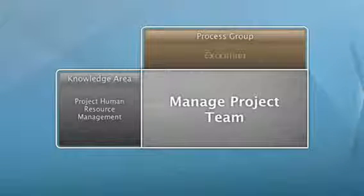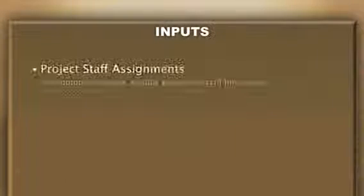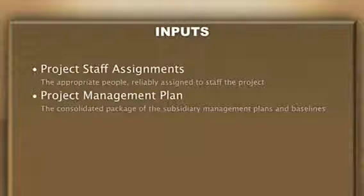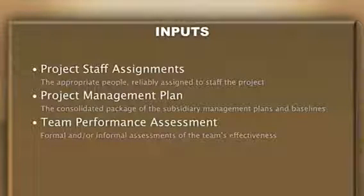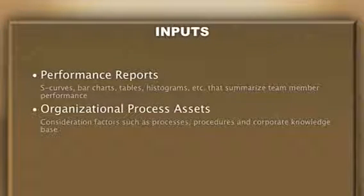Manage Project Team is an executing process. This process tracks team member performance to enhance overall project performance. There are five defined inputs: Project Staff Assignments, Project Management Plan, Team Performance Assessment, Performance Reports, and Organizational Process Assets.